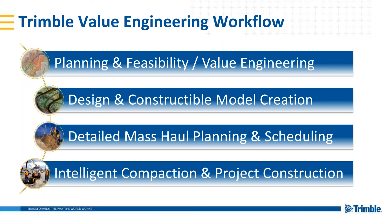For detailed mass haul planning, you can do bulk mass haul balancing within Quantum and then do more detailed analysis within Trimble Business Center. The system is inherently considering costs and trying to balance earthworks — the more material you're moving throughout the alignment, the greater the impact on construction cost. If you want more detailed analysis, drop that alignment into Business Center, do your corridor mass haul, and then proceed to intelligent compaction and project construction as the end goal of that workflow.